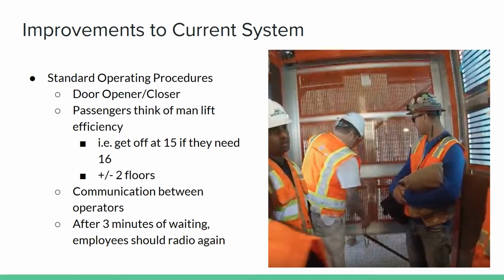So getting off at an earlier floor and climbing up the ladder could save a lot of time in the process. And we believe that within 2 floors is a reasonable thing to ask of employees without overtiring them from climbing the ladder too much. And this would be a way to improve the efficiency of the lift because it is not stopping at as many floors.